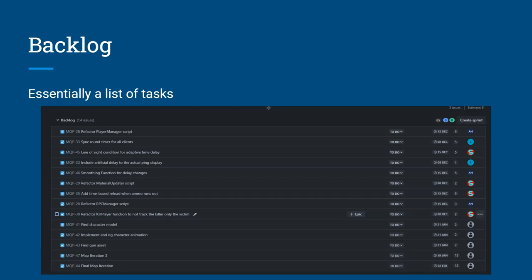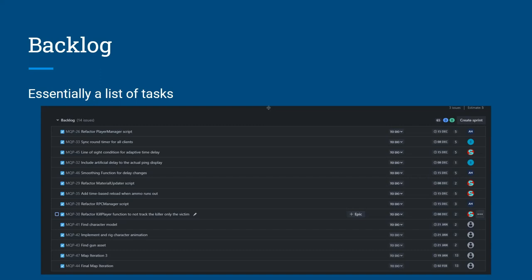Now, you will not know all the tasks that you need to make. Sometimes they are uncertain. There are ambiguous tasks. So for example, Alphafest, you get feedback from playtesters. The feedback that comes in ends up being ambiguous tasks, tasks that you did not expect to have in the initial backlog creation. And so it's you as a producer, your responsibility is to reprioritize, reorganize your backlog, such that you incorporate the feedback that you get, more user requirements that you get into creating a backlog that handles those MQP tasks.